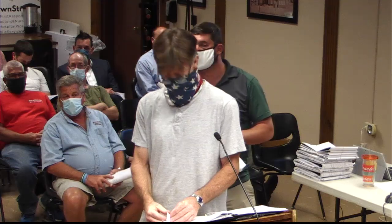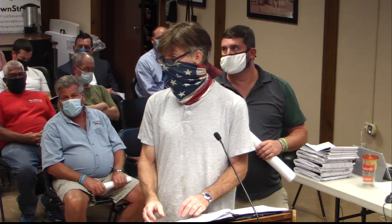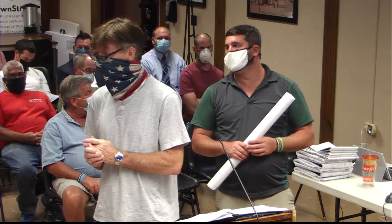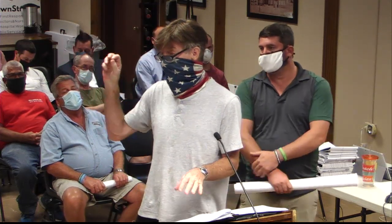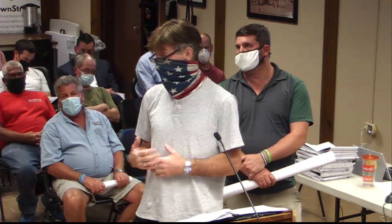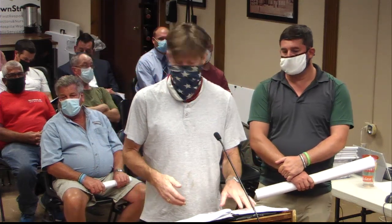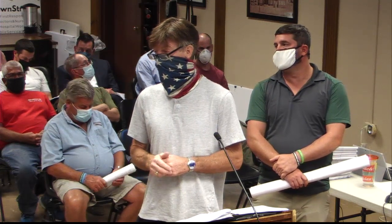The brook, to be honest with you, I think the brook is going to be the more important thing of anything on that piece of property. As it stands right now, there's no shade for the water, so it's all algae evaporating. That's going to be where we're probably going to put most of our work. The north side with Route 6 is obviously going to be tied in as a priority. Over the mitigation, it'll probably be a 2 or 3 year program to remove all the invasive species. But the brook right now, as you see the plan, is going to be a priority for us. For everything on that piece of property, that brook has to be taken care of.